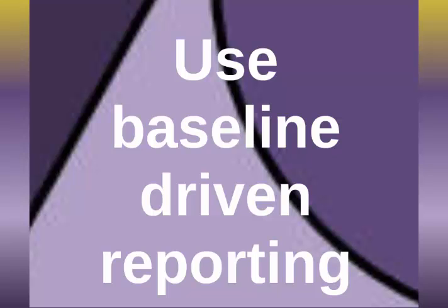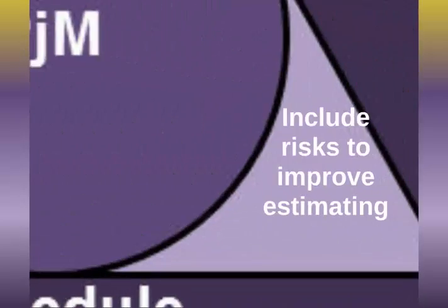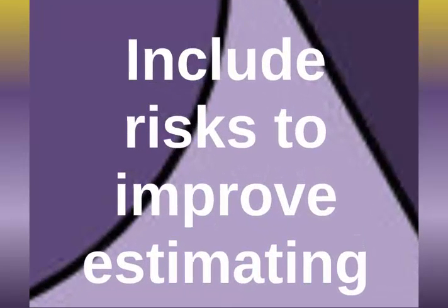In fact, some organisations attempt to estimate the optimistic and pessimistic views of expected performance, as well as the realistic view. It is important that the realistic view of project performance is indeed realistic. Within your organisation, if you measure project performance, do you find that the most common stated reason for projects underachieving, in other words exceeding timing and/or cost estimates or producing poor quality deliverables, is that the initial estimates were unrealistic? The key to achieving more stable estimating is risk assessment.